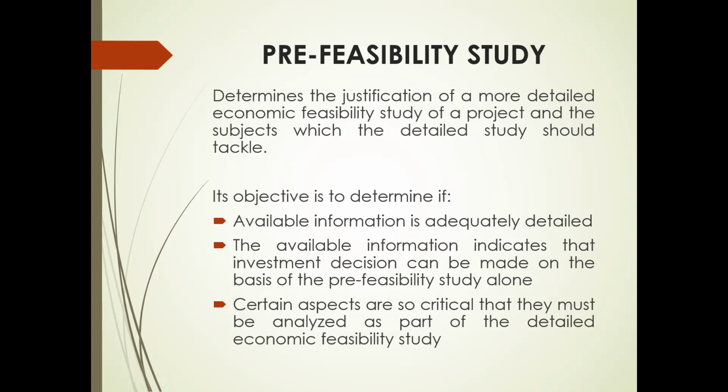And then the available information indicates that the project is so promising that an investment decision can be made on the basis of the pre-feasibility study alone, and that detailed study is no longer needed. And certain aspects of the project are so critical to its viability that they must be analyzed as part of the detailed economic feasibility study.